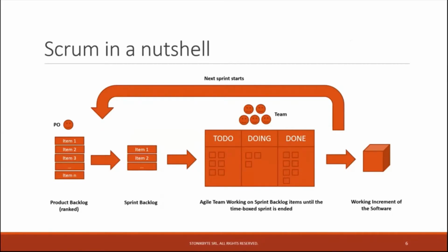Scrum as a methodology, as a framework, is suitable for development projects. It's for mid and long-term projects that take weeks or months, in which, for example, you have to develop a software product. The first step in building that software product is to create the product backlog, which consists of a set of items to be developed in order to obtain the software application at the end. So the first step is to create a backlog.